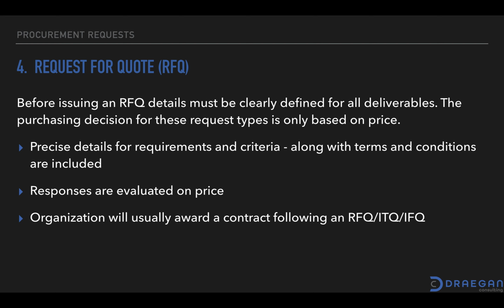So proponents that respond to requests for quotes are going to be evaluated and ranked solely on price. So the requirements are articulated in such a way that there isn't wiggle room on them. So this is exactly what we're looking for, and this is how you're going to respond, and I'm going to, as the organization, rank based on cost.